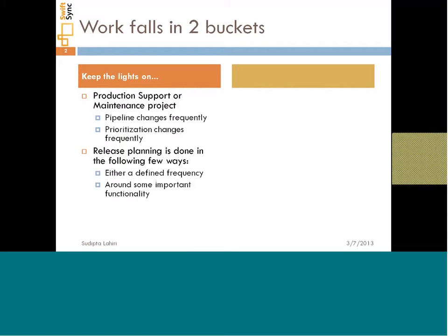So let's say if you need a Thanksgiving release, then they would say, okay, then this is the feature functionality that needs to be ready for Thanksgiving, and therefore whatever gets fixed in that timeline goes in as part of that release. So that's the two primary ways that we've seen schedule being controlled in this mode of work. And estimation is primarily limited to key work items. Nobody does estimate each and every defect or each and every ticket, but estimation is primarily linked to the more major enhancements or the critical items.